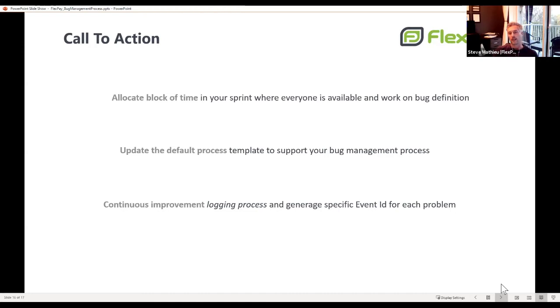You need to modify the process template with some fields to put information and keep the state. The way we keep state is by using the state and the person who's been assigned. So when we have a bug in triage, it means someone has to take it. If I decide to work on it, I'm going to assign myself to it. When I'm finished, I'm going to transfer the bug to the next phase with nobody assigned to it.